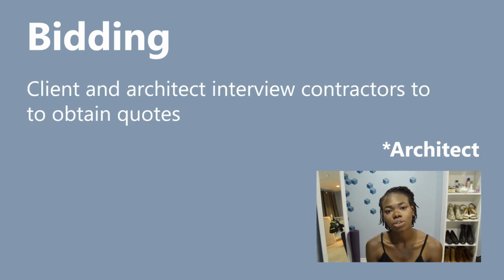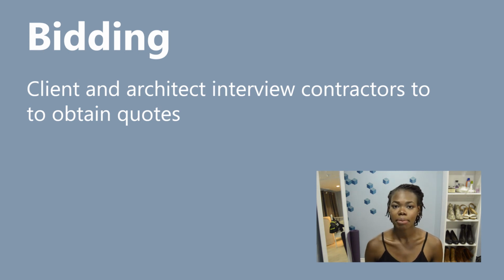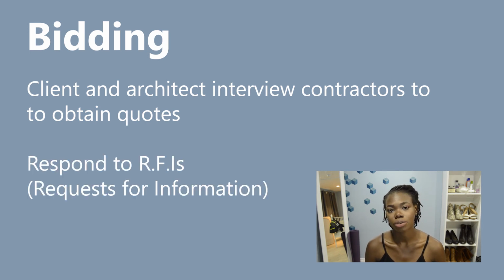The second to last phase is bidding. And what happens in this phase is that the client and the architect will interview contractors and see who is capable and willing to produce the work that they want, give them quotes, and also respond to RFIs, which is request for information, and I'll talk about that in a minute.